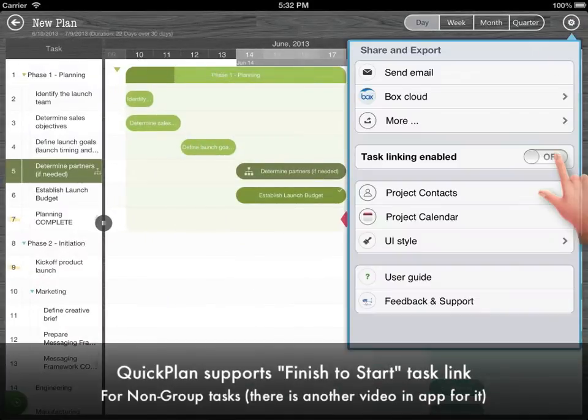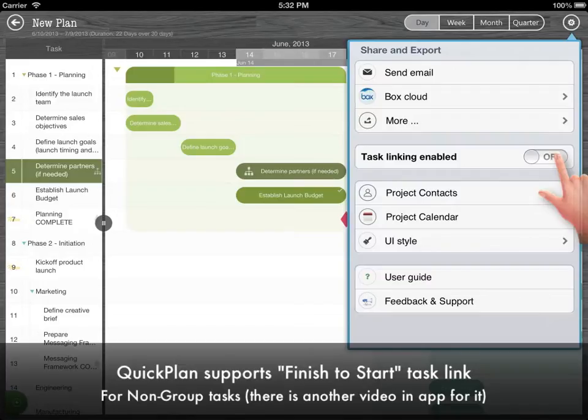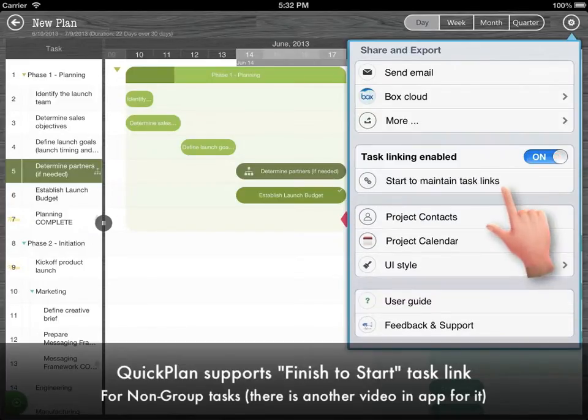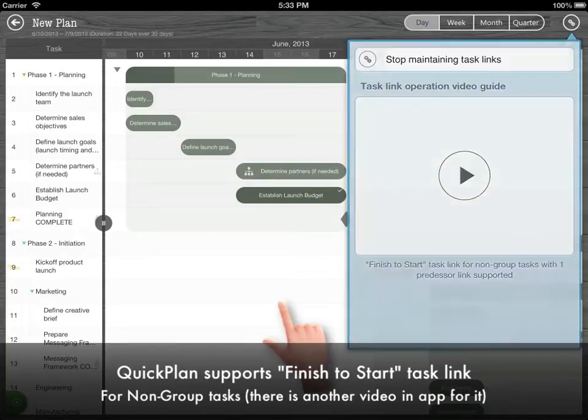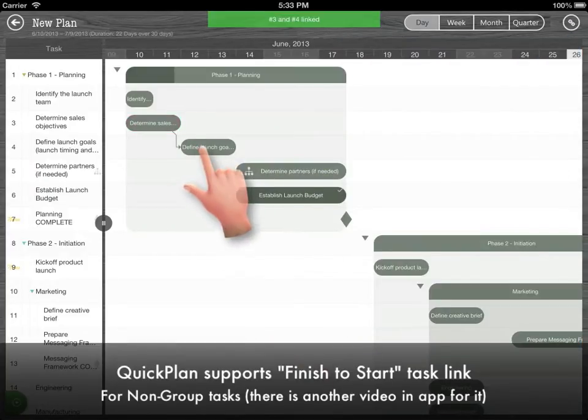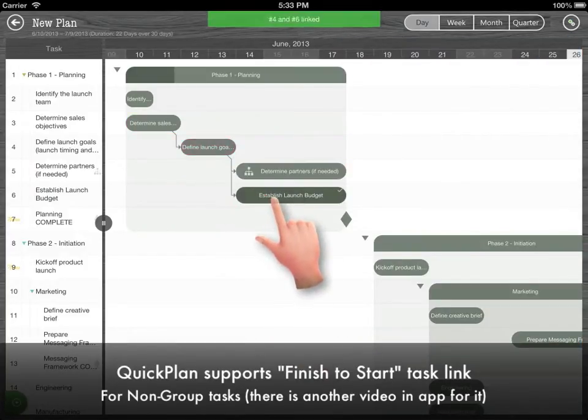QuickPlan supports finish to start task link for non-group tasks. Enable linking feature, then start to edit links.